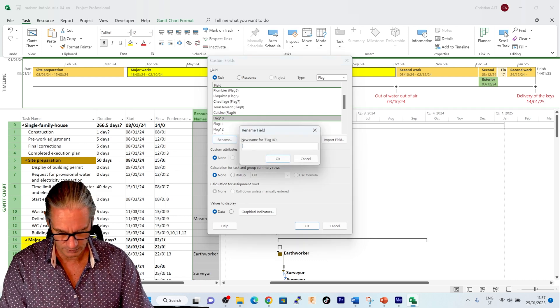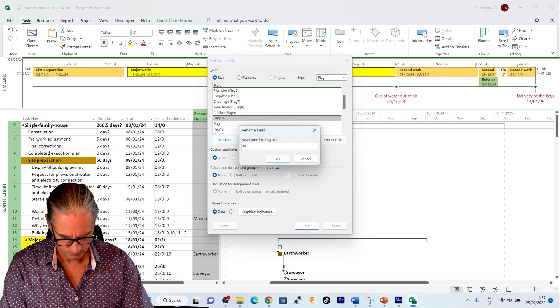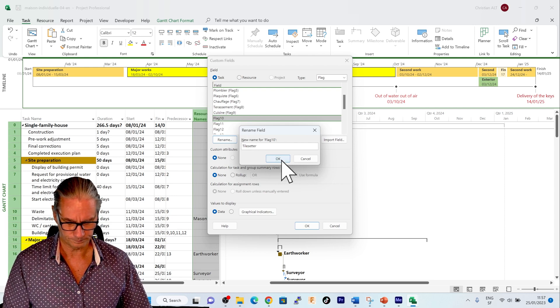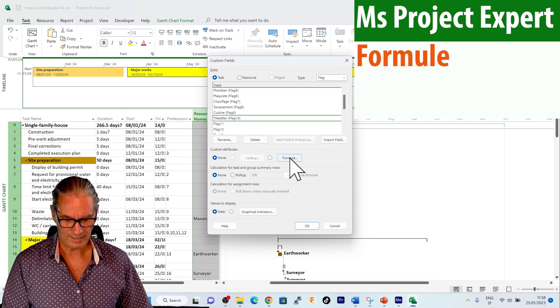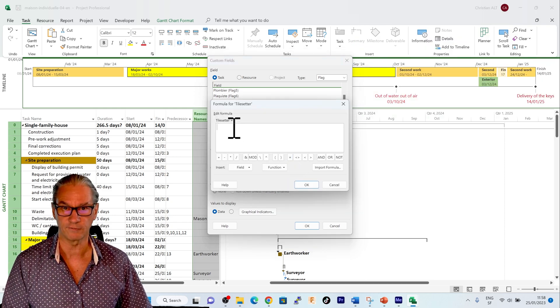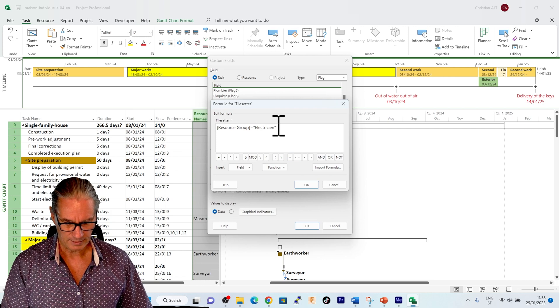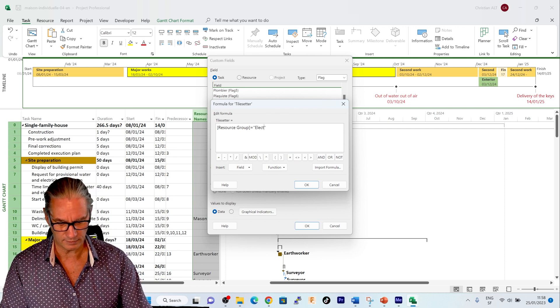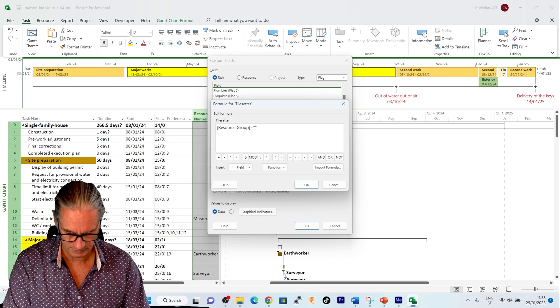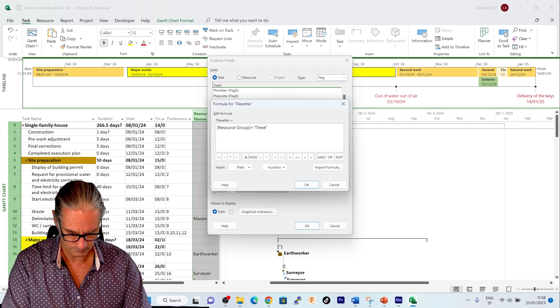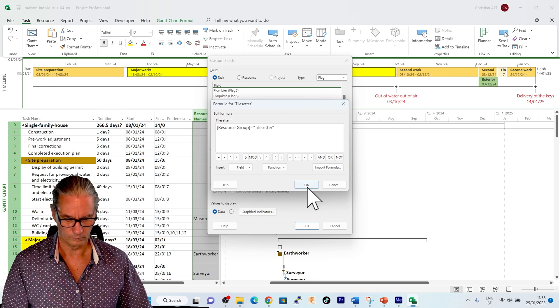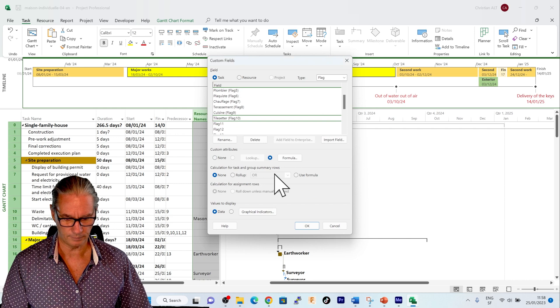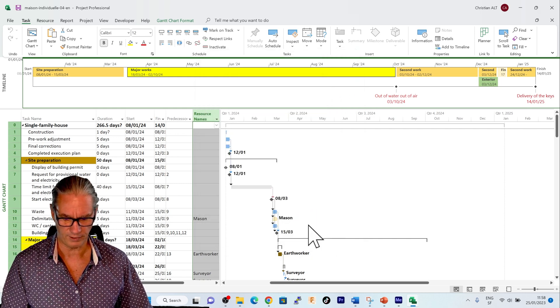I rename it to tile setter. And now I'm going to change the formula for this one. And I'm going to say that whenever it equals tile setter that it takes the actions. Just say OK. Here everything is just fine.